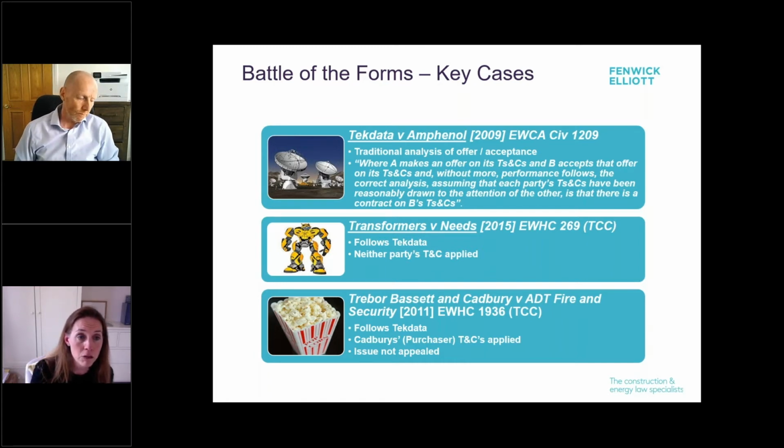And actually, the contractual setup was a complete mess. So Transformers had printed its T's and C's on the back of its purchase orders, but it didn't refer to them on the front. And this is a classic error, actually. I've seen it catch people out, and I've also seen it where people do refer to them on the front of their purchase orders, and it's really helped them. So that's a tip for the future.